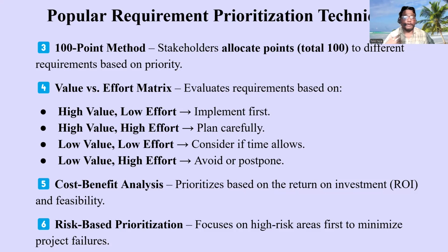You need to build high value, low effort products first, and you have to give major importance to high value and high effort in the next phase, after building the high value, low effort quadrant requirements.